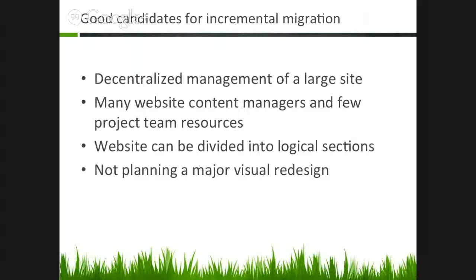So of course, you have to be able to divide your website into logical sections, whether it's a sub-site or maybe you can divide it by content types. Maybe there's user groups that you could divide it by, so you have a developers site and a marketers site. Any way you can divide it, this can work, but if your site is so interdependent on itself and there's data flows everywhere, this might not work for you. Also, if you're planning a major visual redesign, it's probably not going to work for you, because as your users go from one page to the next, they're going to get a different visual experience. So that unity has to be there on the site if you're going to try this approach.